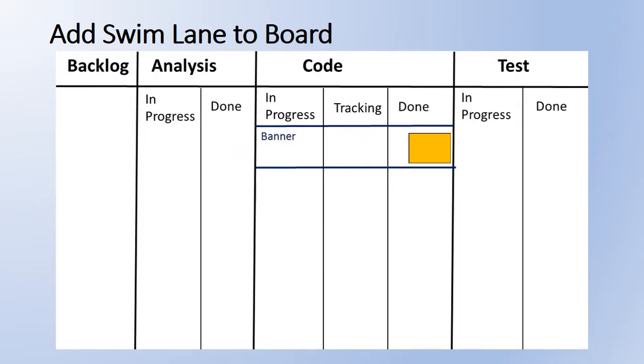Kanban limits the chaos in the development process by limiting the work in progress. How do we find those limits? When determining work in progress limits, there are some factors we have to keep in mind. Are the people on our team working on this project exclusively, or are they on multiple teams working on multiple projects? How many different steps in our project is each person covering?